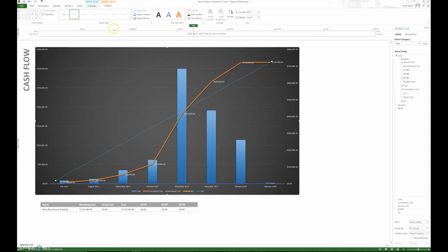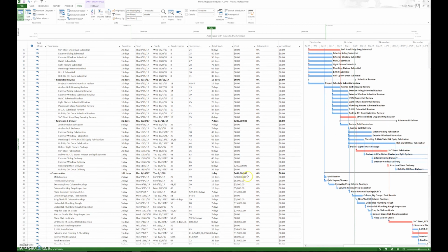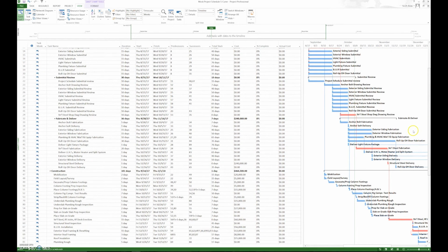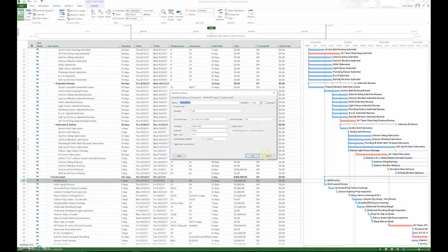In this case, we're not making too much money on the front end of this project. So let's go back to the Gantt chart view here real quick. And keep in mind, we're trying to put together a schedule at the very, very beginning, and that's tough to do, because we may not have all the data. So we can take some money from the back end, moving money around from tasks that take place at the very end, and I'm just going to say, instead of 20,000, I'm just going to throw an extra zero in there and call it 200,000.